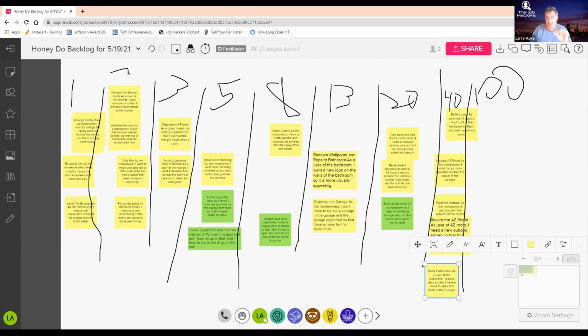I just want you to get this because I get this question every time. So I want you to listen very carefully if you haven't been yet. You're going to do effort with the people who do the work, just like we did here. And then you're going to take that same group of work to people who know the value, which is usually business people, and you're going to ask a different question. You're going to ask, if I delivered this today versus this, which one gives more value? And I want to answer it that way because really what I'm going to compute in the end is cost of delay.